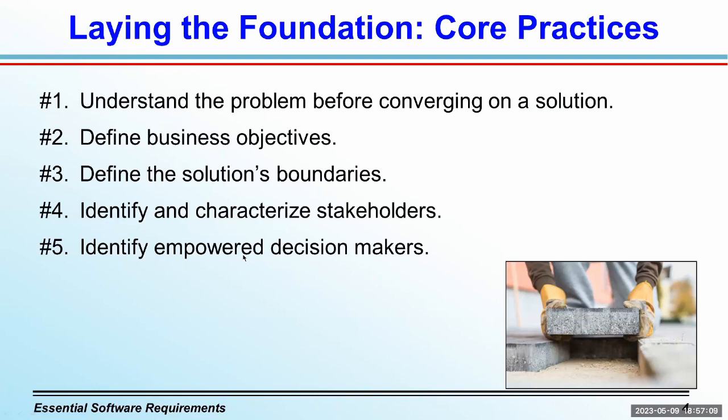Every project faces many requirements-related decisions. These include resolving conflicts both within and across user classes, prioritizing requirements, evaluating proposed requirement changes, and many more. So I think it's important to determine who the decision makers will be for these requirements issues, preferably before they confront their first significant decision. And each group also needs to choose a decision rule to apply when they're resolving issues.